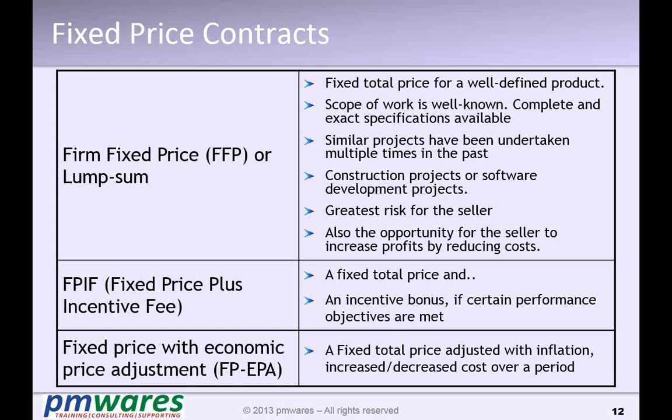I am the buyer. I want to get the things done in 6 months. Now I say, if you do this work a week before the date we have decided, I will give you 50% of the cost saving, or I will give you a fixed price. Say you will get $10,000.